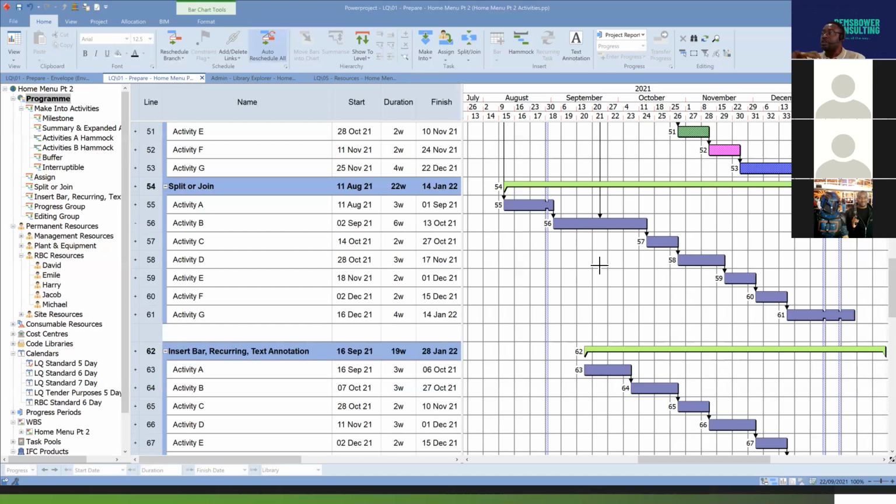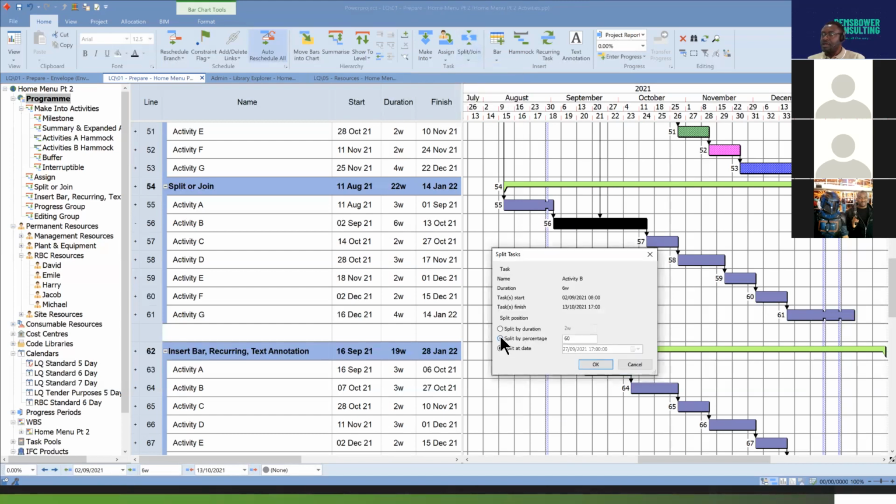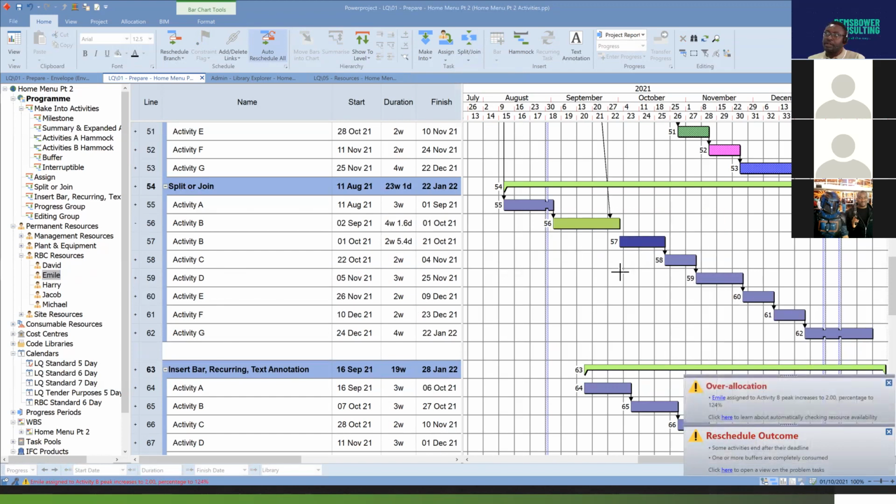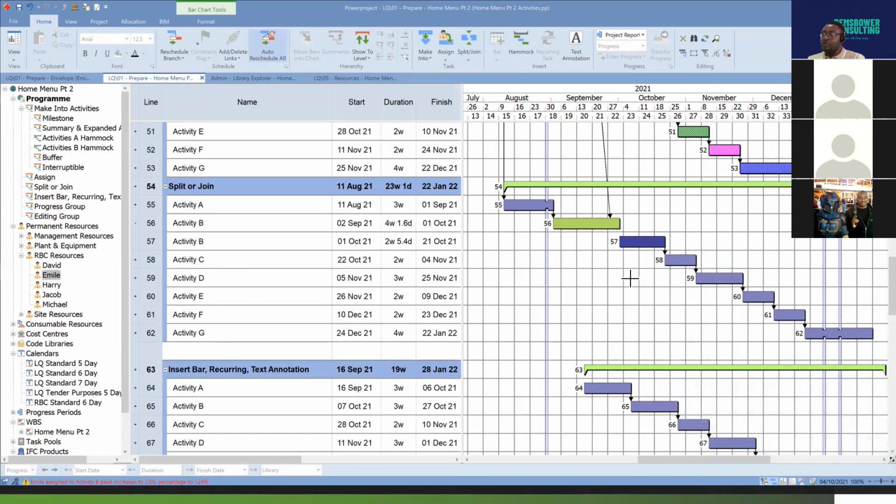I completely understand your question. Yeah, you could use that if you want to. What Harry is asking is that if I split this by percentage, and I use 60% there, and then I allocate David to that, and I allocate Emil to that. Correct? Yep. So something like that. Yeah, you could say, okay, I want David to be the one in charge of this activity, even though it's the same activity, but when David finishes, he passes the baton on to, I don't know who this is, Emil. So that's basically an instance where that can apply. Okay.